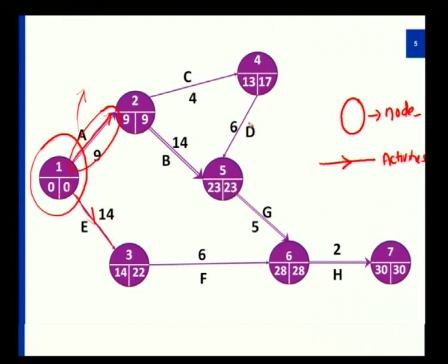B and D joined together now make the initiative to start with G. So I have joined B and D together by completing it as a node, which will be the start for G. Same as in the other flow, after completion of E, I can start with F. After completion of F, I can start with H, but it requires G again. So when I complete G and F, only then can I start with H.